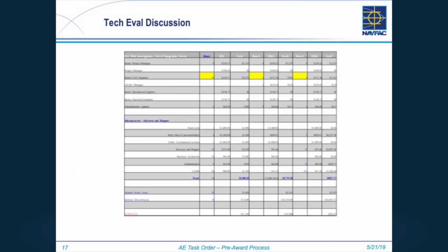So in this particular one, and I've got them separated, I apologize that you can't see it very well, but I wanted to show that this is the 4-column format, so this is the spreadsheet that you'll send back to your 1102. The person that did this one highlighted, this is what I'm talking about. In this case, the IGE was 16, the hours were 2, and I think somebody in here might recognize this one. And we're proposing back, they need 8.